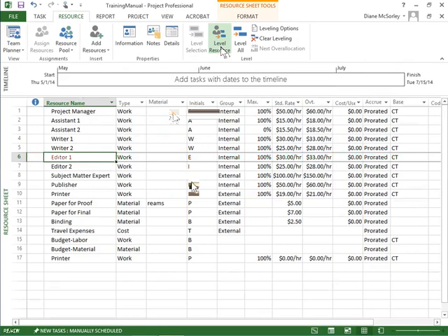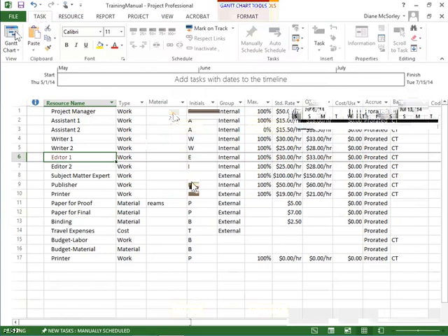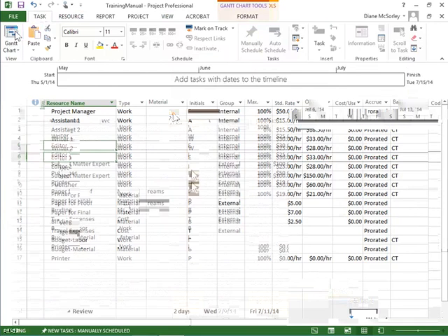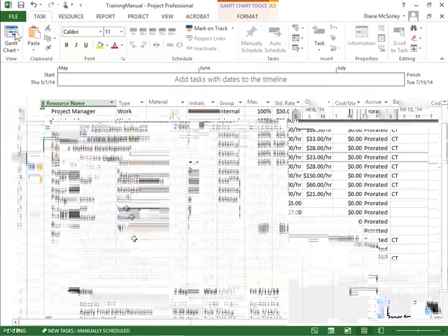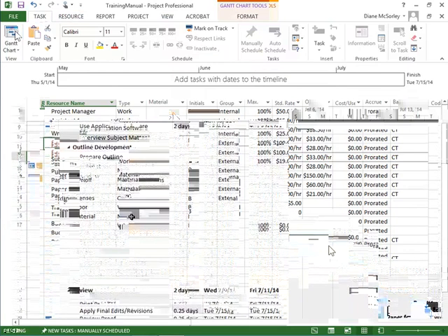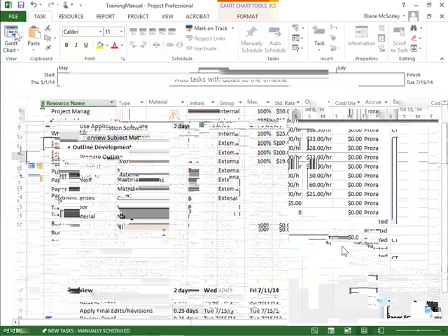The red went away. Woohoo! What does that mean, right? What happened? Well, let's take a look back. So let me head back to Gantt chart view, and let's see what's going on with that task. It was down here, these two, spell check and technical editing. And you can see what it's done is it's pushed the one task out. So the first task can finish, then the next task can begin.